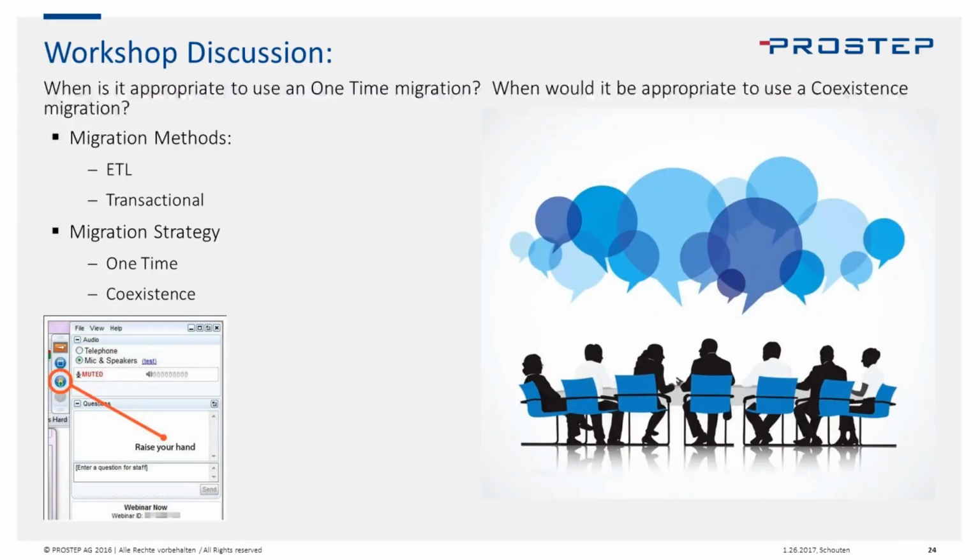So we run into situations all the time where companies put in, we're going to have dedicated training for the next 6 months, and part of your objectives is to go to, I'll just make something up, Teamcenter training. And the people who started in month 1 of those 6 months, by the time it comes to go live, which oftentimes is delayed for whatever reason, let's say a year later, they've forgotten everything they learned, right? Or they've got a certificate that they pinned in their cube, or they've got a big binder that they've stuck in their cube of what the new Teamcenter looks like.